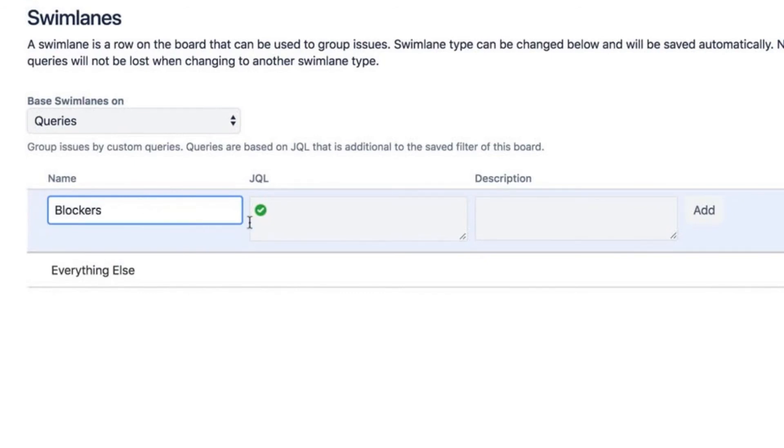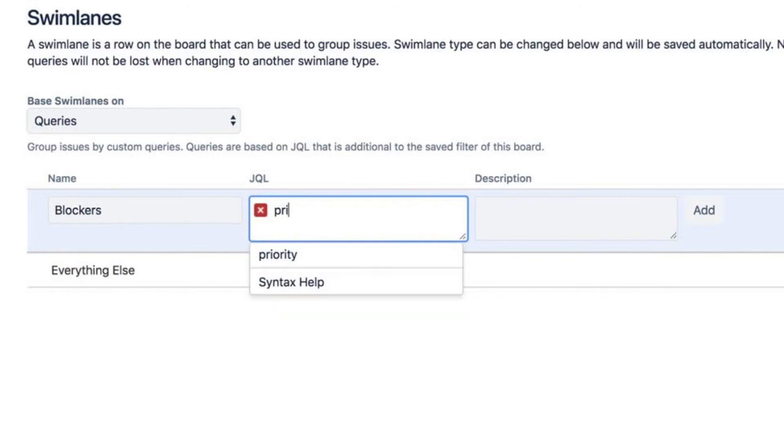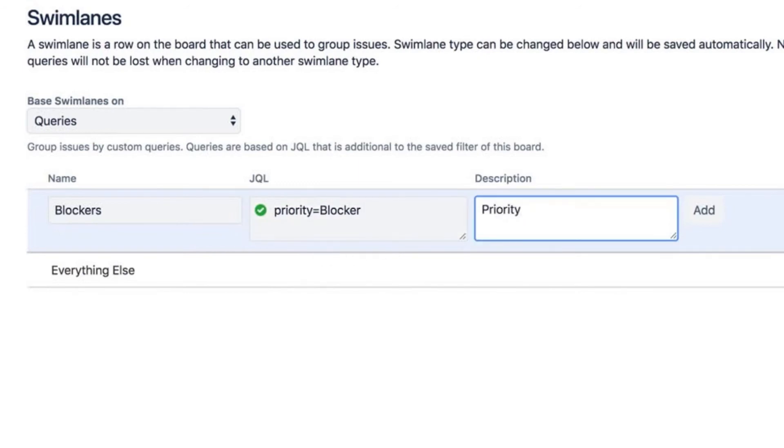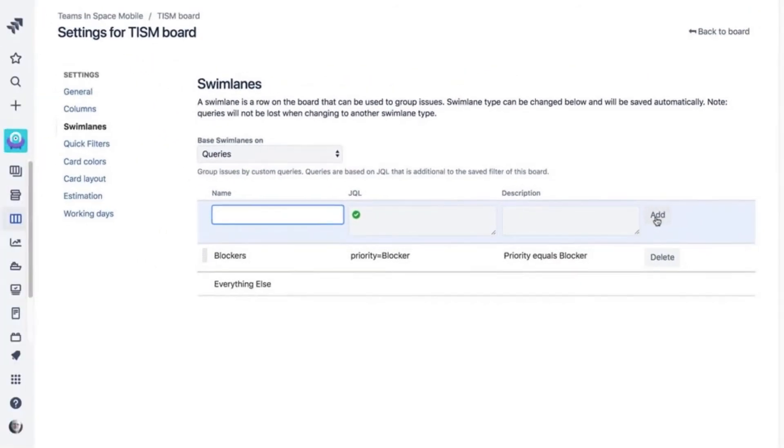Let's select queries and give the swim lane a name. We'll call this one blockers. To create the query, click the JQL box and enter this query: priority equals blocker. Once created, issues labeled as blockers will group together in a swim lane at the top of the board.